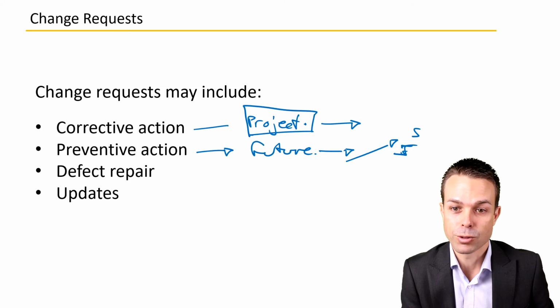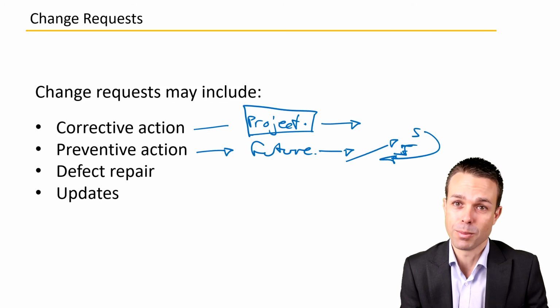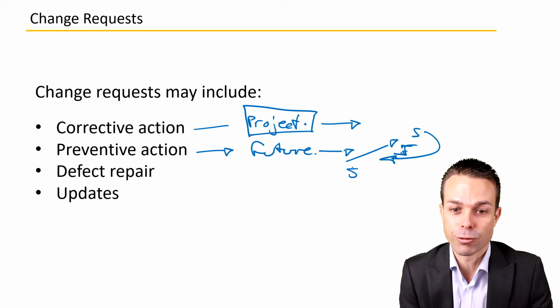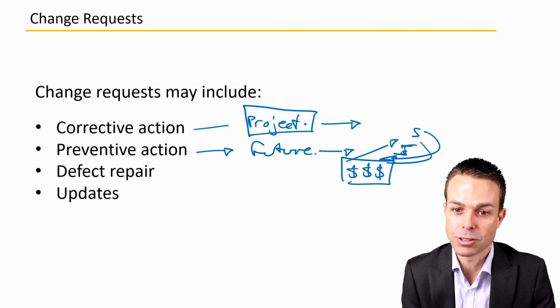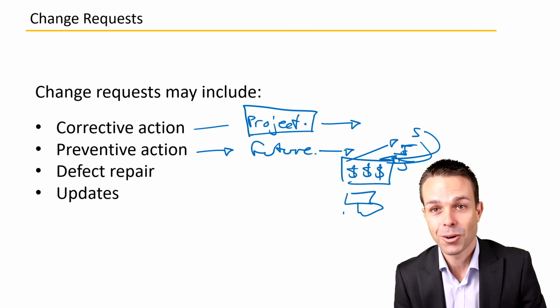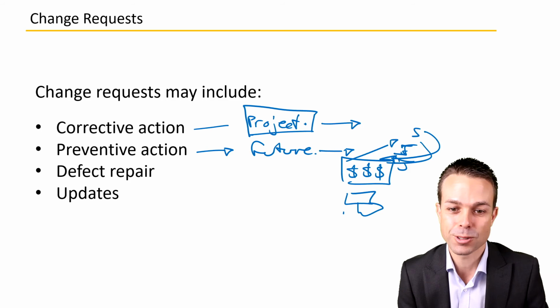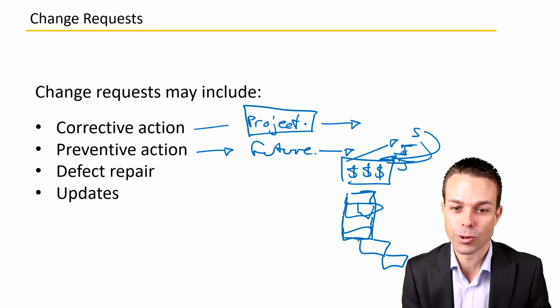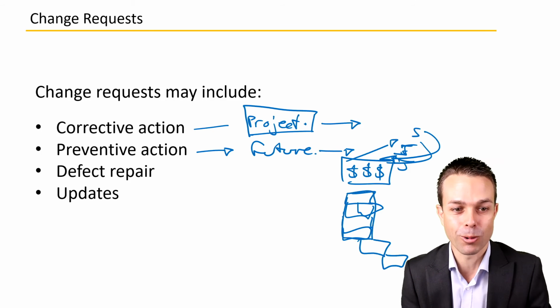That's something that we want to bring back on track, for example. Maybe we want to crash the project resources and add a lot of resources and money and cost, and that's going to bring it back into June so that we can get it done. Or maybe we need to fast track the schedule, so doing everything in parallel instead of doing everything one after the other, and that'll get it all done perhaps in time for what we want.